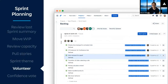Next, we volunteer for stories. Since we want to encourage swarming and pairing up on stories, these are fluid — they aren't fixed individual story assignments. Really, anyone can work on any story during the sprint. We volunteer just for the first few stories at the top of the sprint backlog so we understand who is starting where.